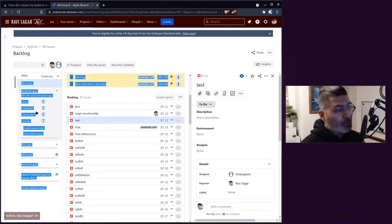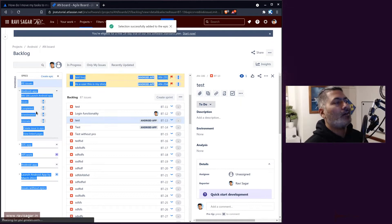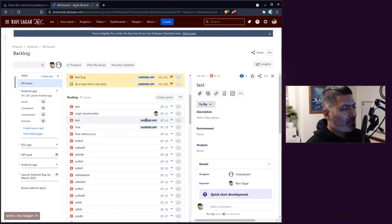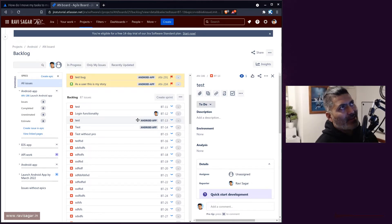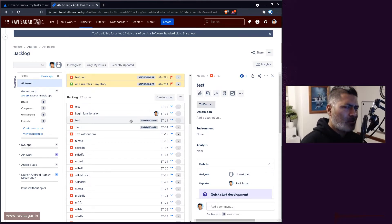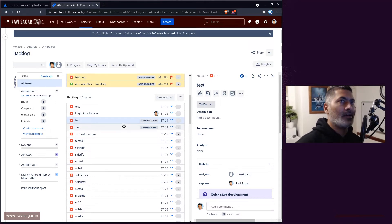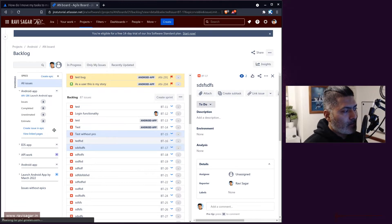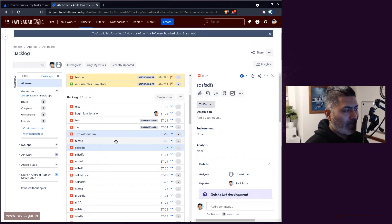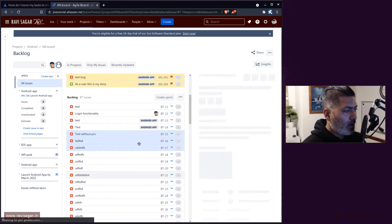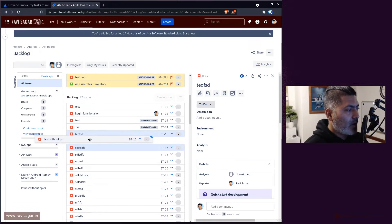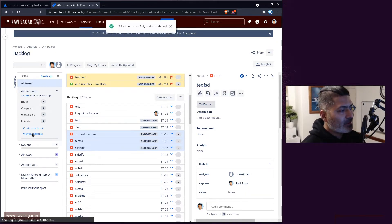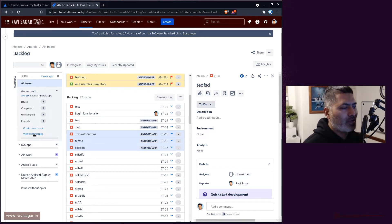For this particular bug — or story, depending on your issue types — the moment you drag it, you'll notice that the epic is now attached, meaning the issue is now part of the epic. You can do it manually one by one, or you can bulk-select issues. If you press Ctrl, you can select multiple issues and then drag all of them to the epic you want to associate them with.